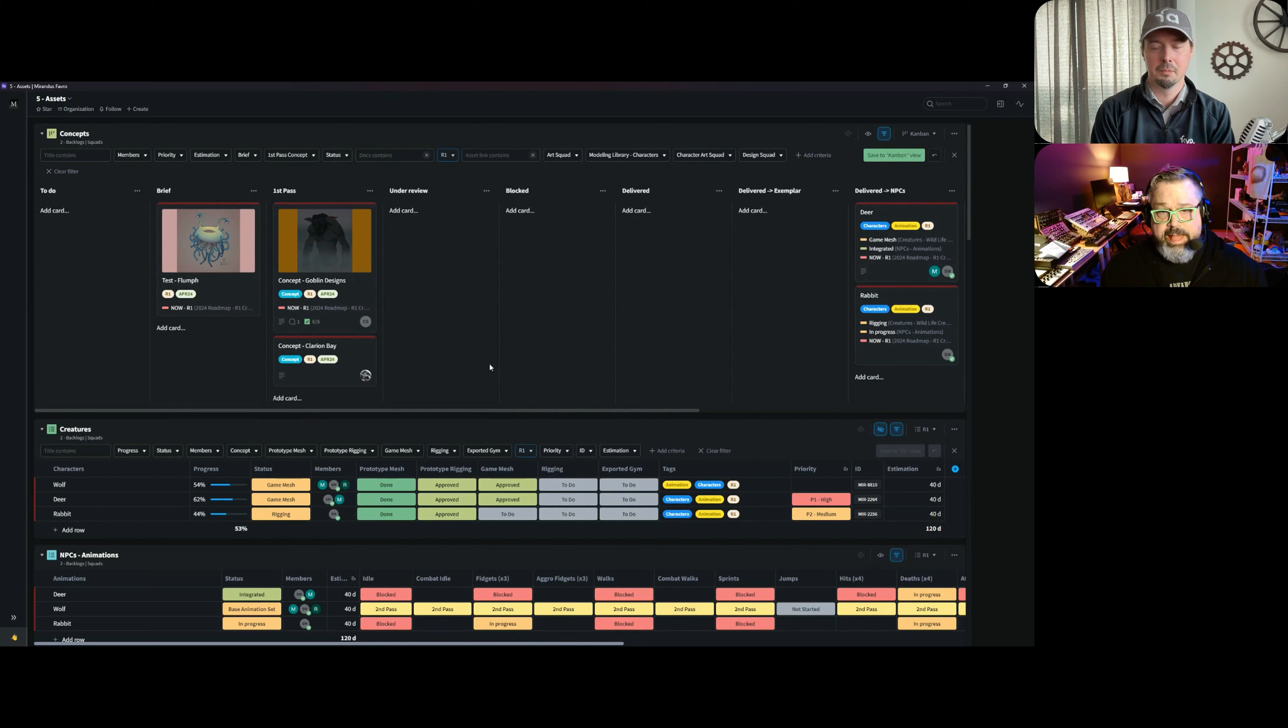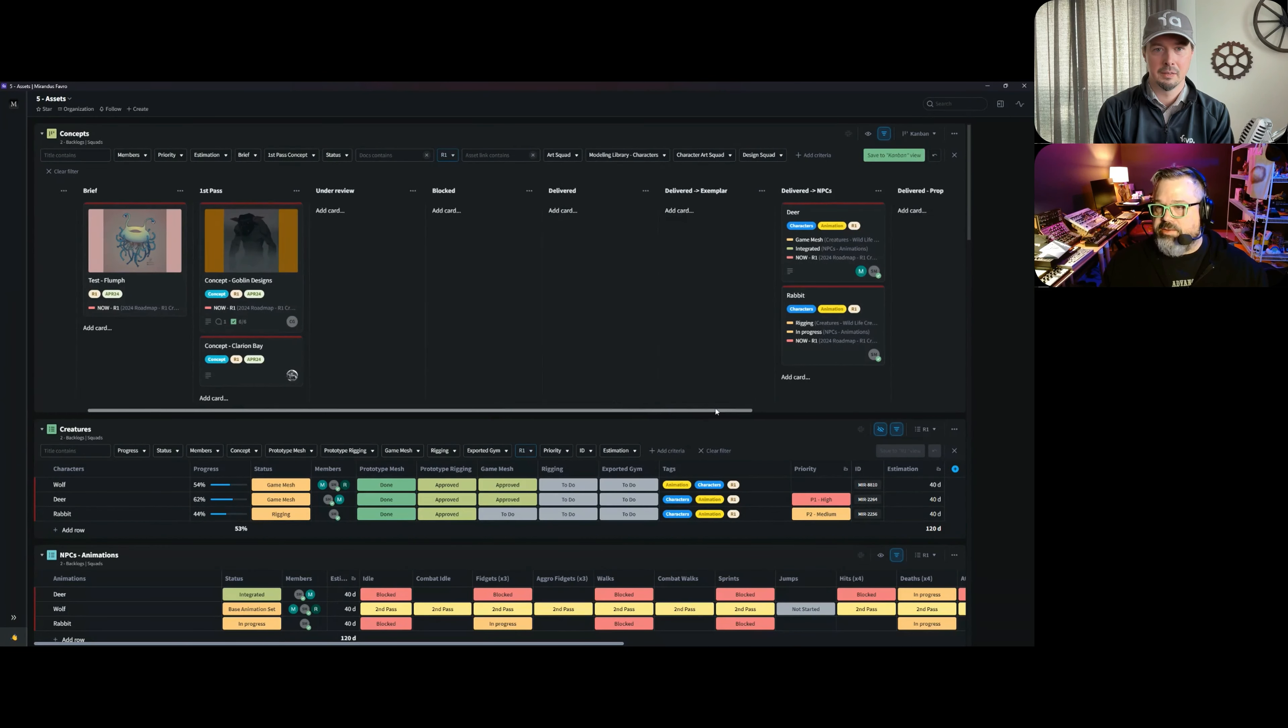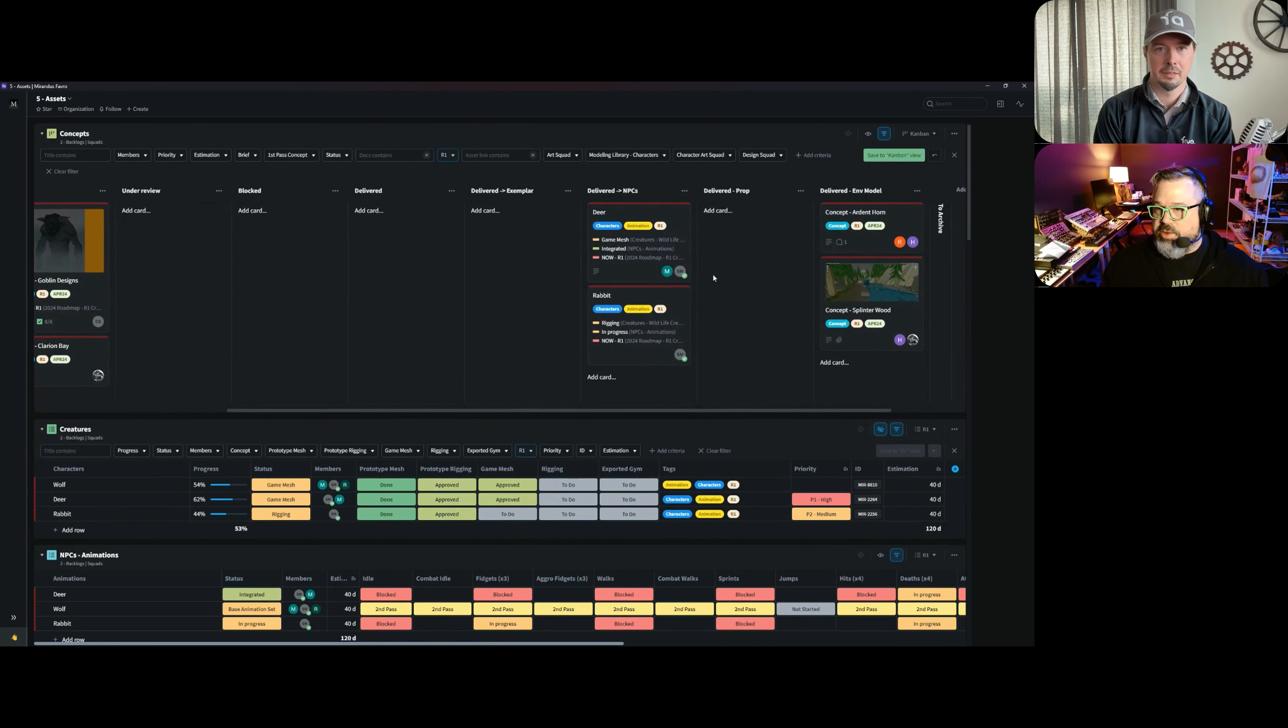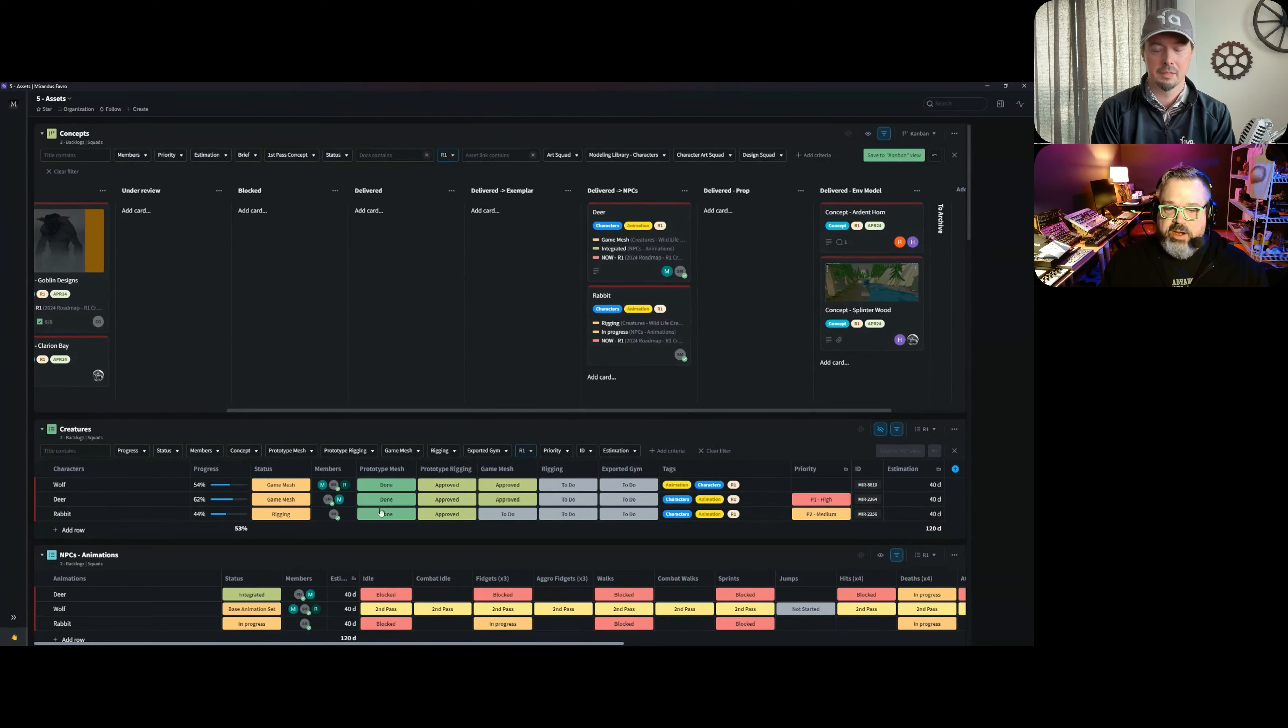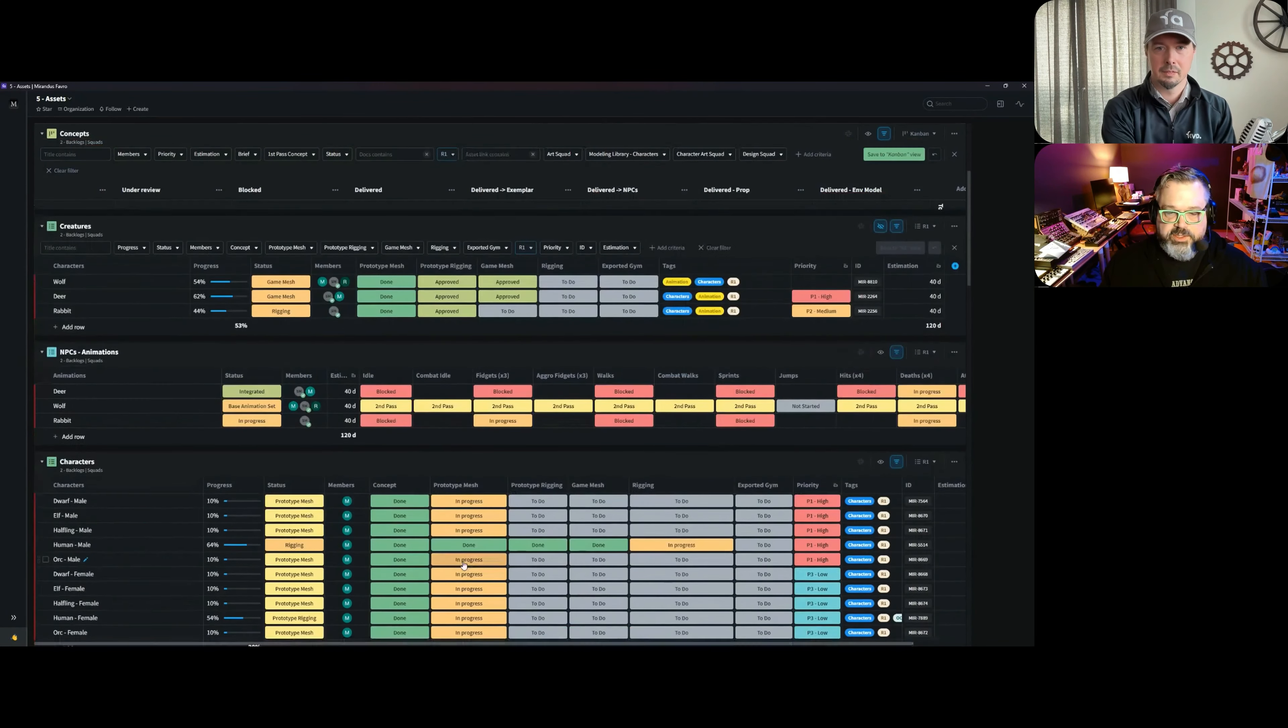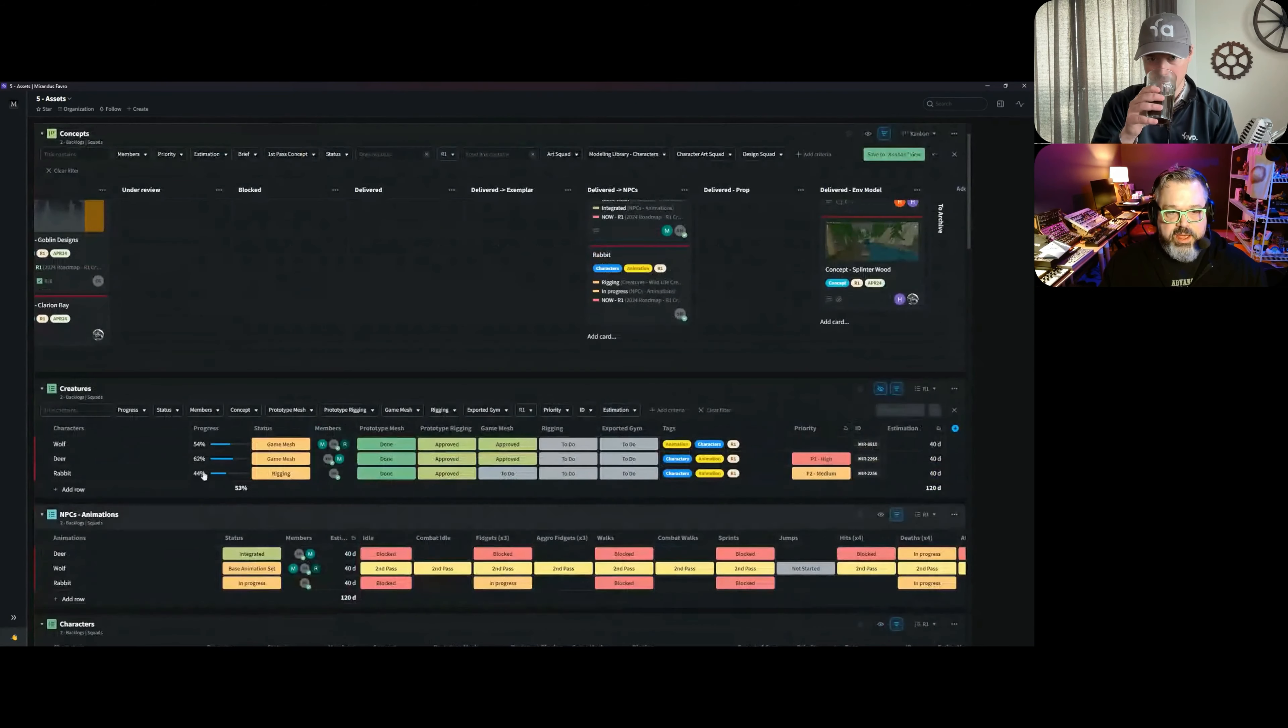But the magic happens when the concept is delivered. Once it's delivered, the art director can drop the card into one of these slots here on our Kanban board. When that happens, the card actually gets distributed to different workflows that different teams are looking at—we have ones for modeling, animation, props, that sort of thing.